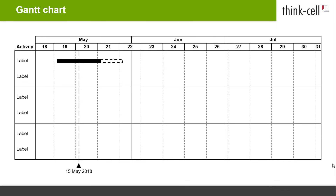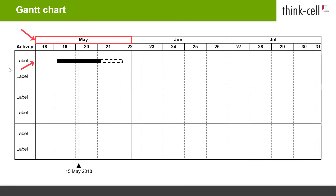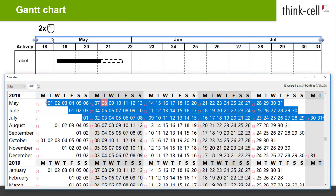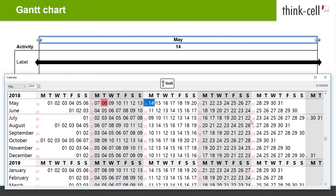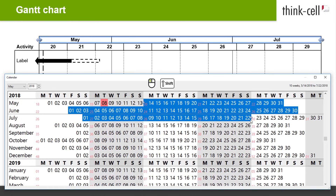By default, the date range of a newly inserted Gantt chart starts with the first day of the current month and includes the two subsequent months. To change the visible date range of your Gantt, just double-click on any of the scales at the top. This opens a calendar in which the current date range is highlighted. To set a new date range, click on a start date, hold down Shift, and click on an end date. Your new date range is now set and is automatically adopted by the Gantt chart on the slide.